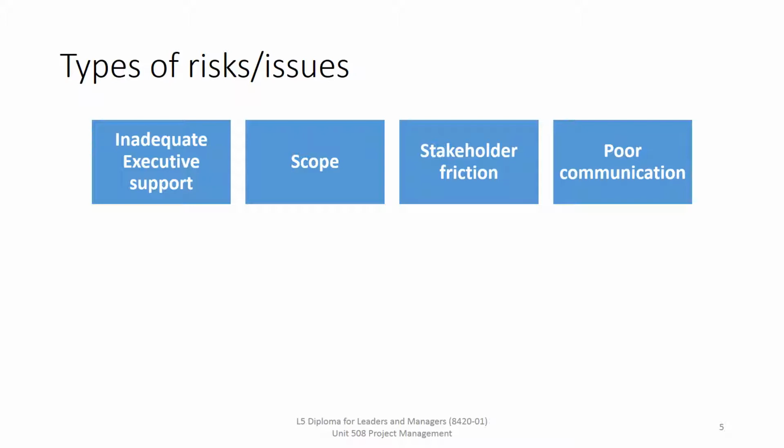And then we can have things around resources and team issues. So insufficient resources available to perform planned areas because we've had a high turnover in a project team, or a lack of required skills, or subcontractors have let us down. All these sort of things can have an impact. And what can we do to try and alleviate them? Well, we can have a workforce plan or a skills matrix, or we can cross-train people, or we can keep all informed and have alternative contractors available.